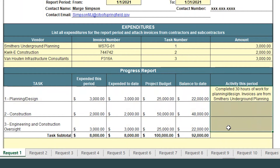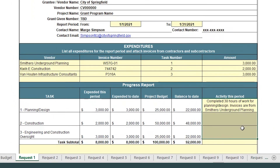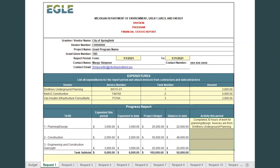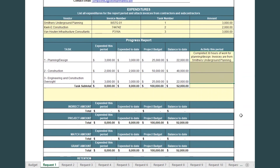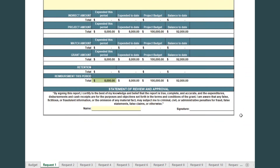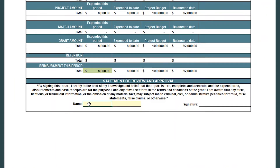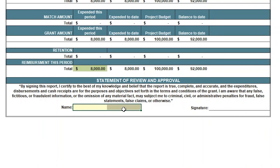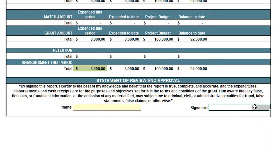After entering the expenses and any project summaries, save the document for use in subsequent report periods. Have the bottom of the Request tab signed by the authorized signer for the grant, then submit this to your state contact via email with supporting expense documentation.